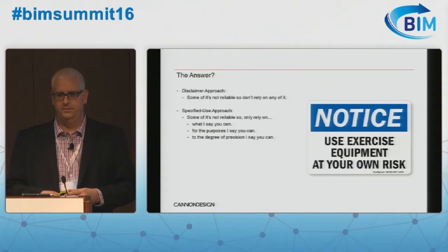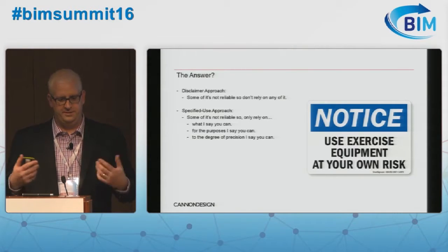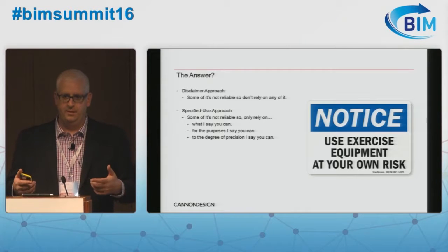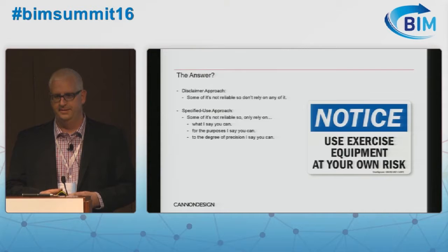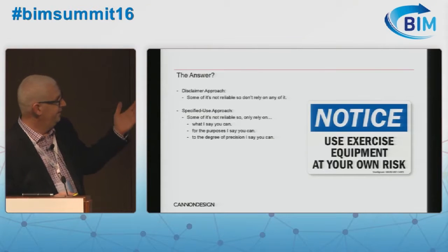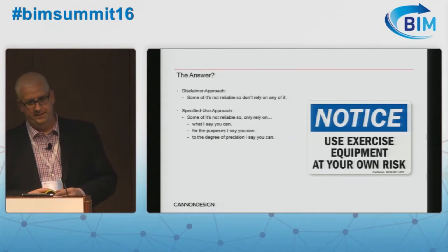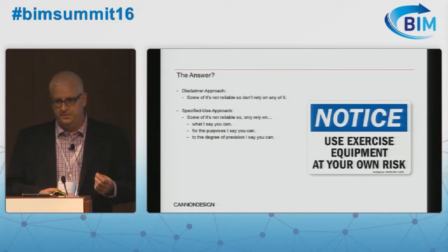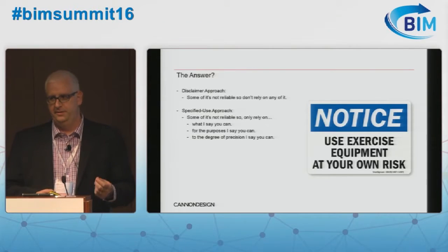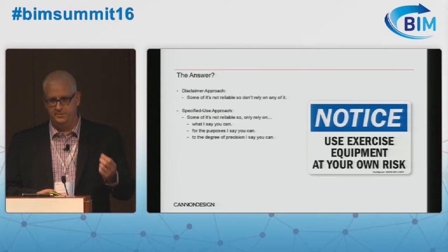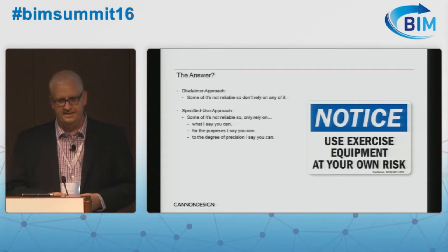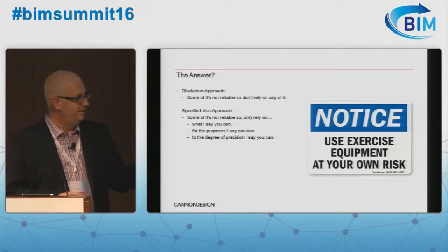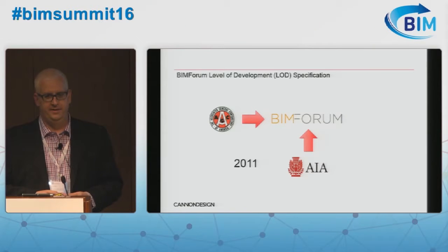And that was really a big hurdle that the LOD specification wants to start to get by and start to drive a common language so we can start to work with our contracts, our BIM execution plans, and other documents to set expectations that are specified, using approaches like we're seeing there. Not everything in the model is to a certain level, but here's the information that is to a certain level of development. Here's what it can be used for. Here's where the dimensional accuracy comes into play. This is what you can trust and rely upon. That's the expectation that we want to get to, not having the blanket comments like use at your own risk.